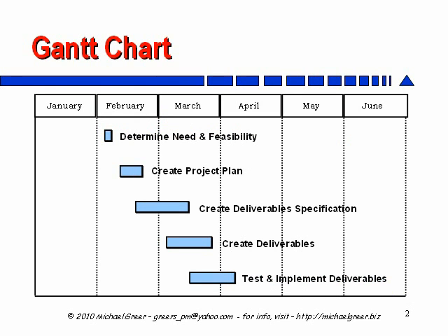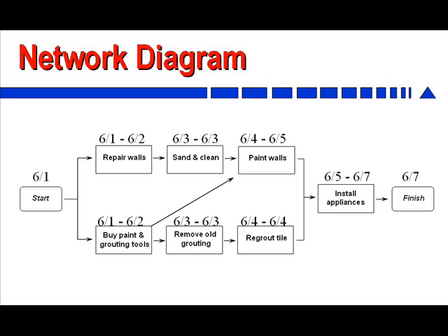It's up to you to pick the schedule that best communicates your overall project structure. And we're going to look at some examples here. A Gantt chart shows the relative duration of project activities and is kind of a nice snapshot. A network diagram, on the other hand, shows the way that one project task flows into another task and where there are tasks converging and where there are bottlenecks. This can help you analyze and pay attention to key points in your project.